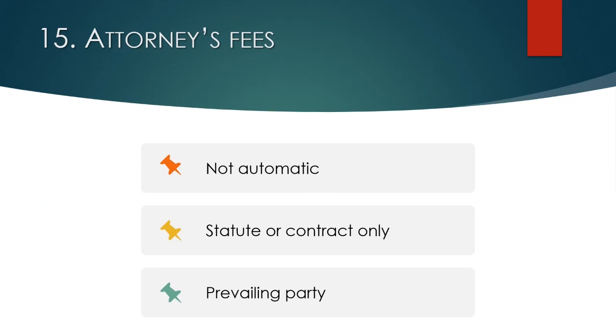Attorney's fees, I'm just going to mention real quickly. We'll breeze through this slide. You ought to have a prevailing party attorney's fees provision in your contract. Otherwise, unless there's a statute that allows for attorney's fees, if you get into a dispute, you're generally not getting attorney's fees.